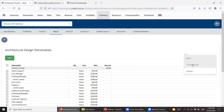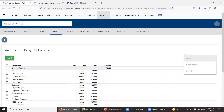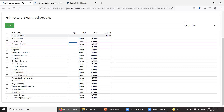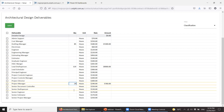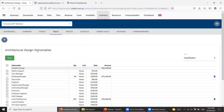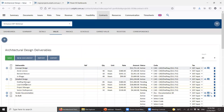Under Detailed Design you've got Admin Support as a classification, Drafting Manager, and then Annie Lennox — she's actually a drafting manager so it's showing who fits that classification. If you don't have anyone allocated it's just a flat line of classifications. You'd go through and say we need 85 hours for that, 120 of those persons on this task, a project manager reviewing it all — hit Save and you've built up an estimate for that task of $43,000 with no people yet assigned.